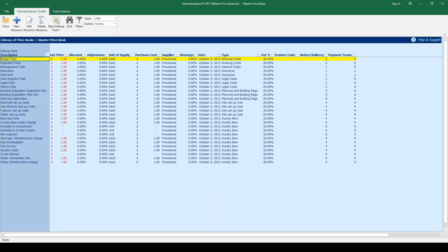They're mostly used in the preliminary workbooks to assign costs to people like structural engineers, surveyors, for planning applications and insurance and so on. So these are basically costs that you as the builder will incur prior to construction starting, but ones which you still need to include in your quote. Unless, of course, you don't like profits, but I think most of us do.